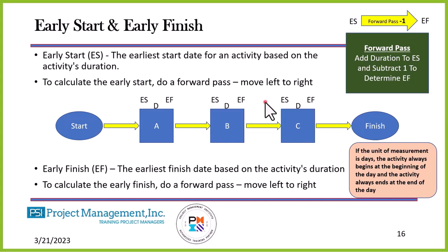At 12:00 a.m., the activity starts. It always finishes at the end of the day. At 11:59 p.m., the activity finishes. Keep that in mind as we do this.